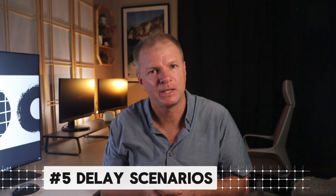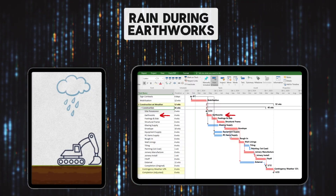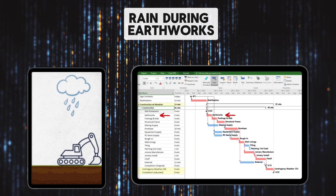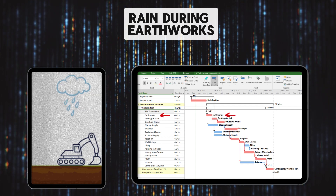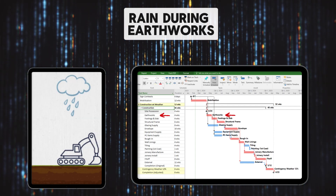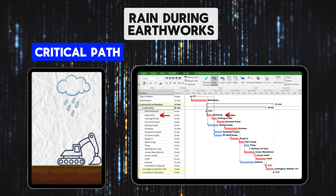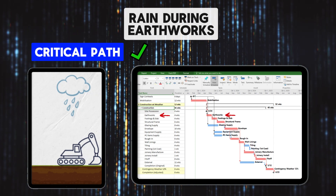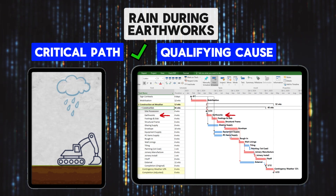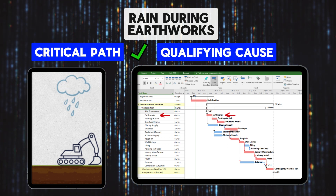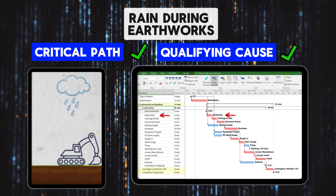Now onto the final part of this video — we will assess five delay scenarios. Let's consider rain during the earthworks. There are two main tests to be applied: does the delay impact the critical path? Which it clearly does. Is the cause of the delay a qualifying cause of delay? In this instance, inclement weather is a qualifying cause of delay — most standard form contracts are drafted this way. Therefore, the builder would be entitled to an extension of time.